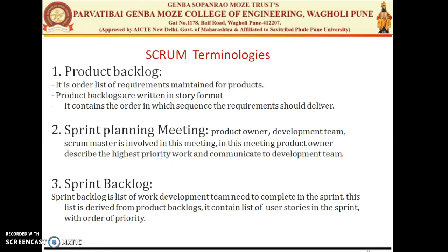Then this meeting contains a maximum of 8 hours. The first 4 hours is for discussing the prioritizing of the requirements and ordering the requirements from the product backlog, and the second 4 hours is for the development team to plan the sprint backlog.